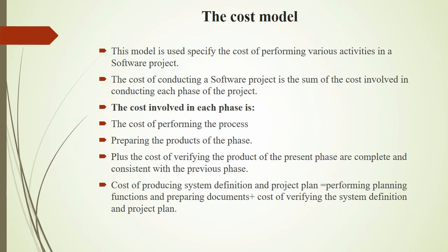The cost model. This model is used to specify the cost of performing various activities in a software project. The cost of conducting a software project is the sum of the cost involved in conducting each phase of the project. The cost involved in each phase is the cost of performing the process, preparing the products of the phase, plus the cost of verifying the product of the present phase are complete and consistent with the previous phase.